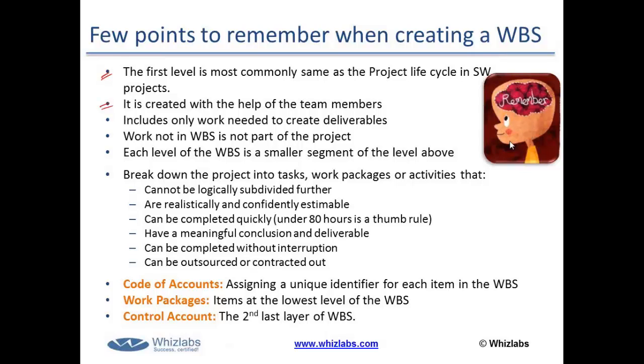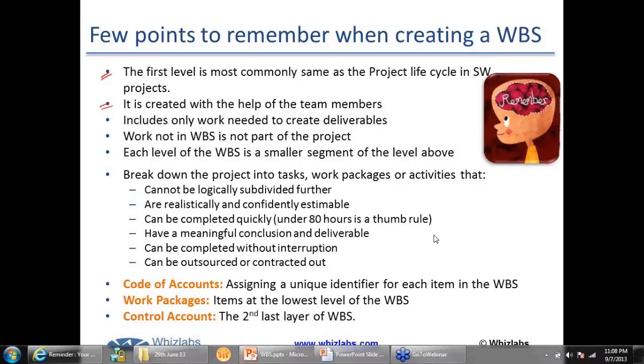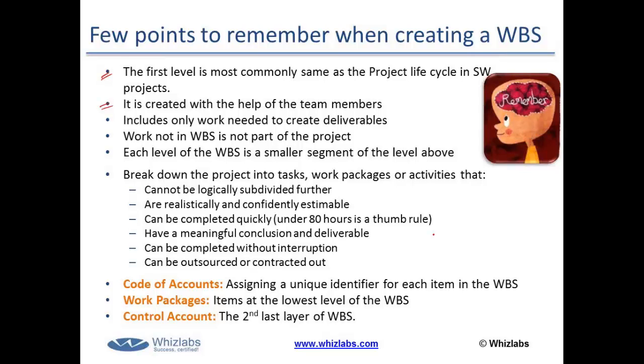Why so? What's the benefit we get out of that? By involving the key team members, we ensure that we get the team's buy-in on the project scope. So if we create the WBS while involving the project team, it helps us gain the team's buy-in automatically for the project scope.